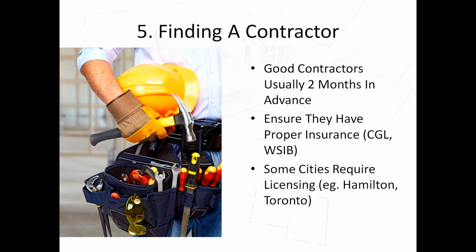Now we're going to talk about finding a contractor. As we mentioned earlier, good contractors are booked at least 2 months in advance, so expect that. Anybody that calls you and tells you they can start next week, I'd be a little bit wary of that. Unless they just happen to have something free up, I would be very cautious of any contractor that has quick availability, because anybody that is able to do the work properly is usually booked at least 1 to 2 months in advance. So make sure they have proper insurance.